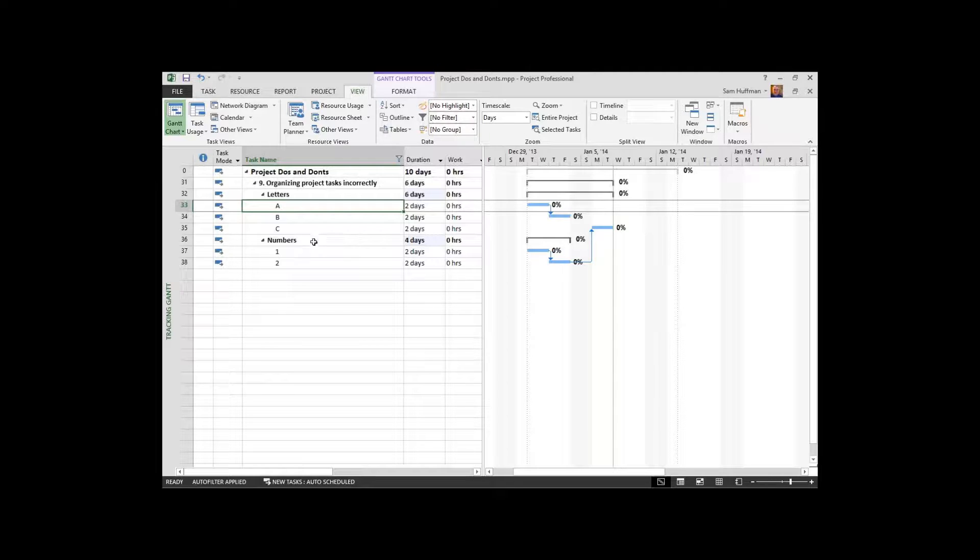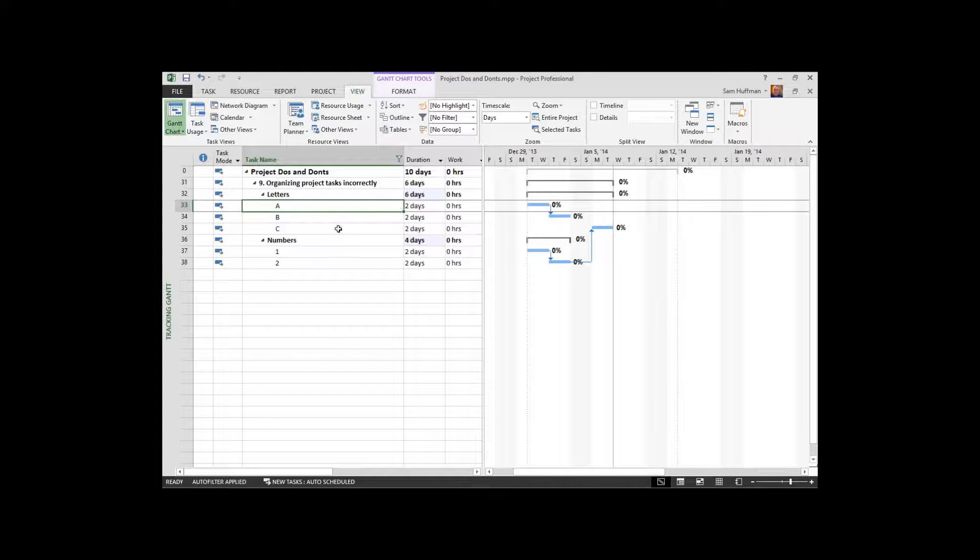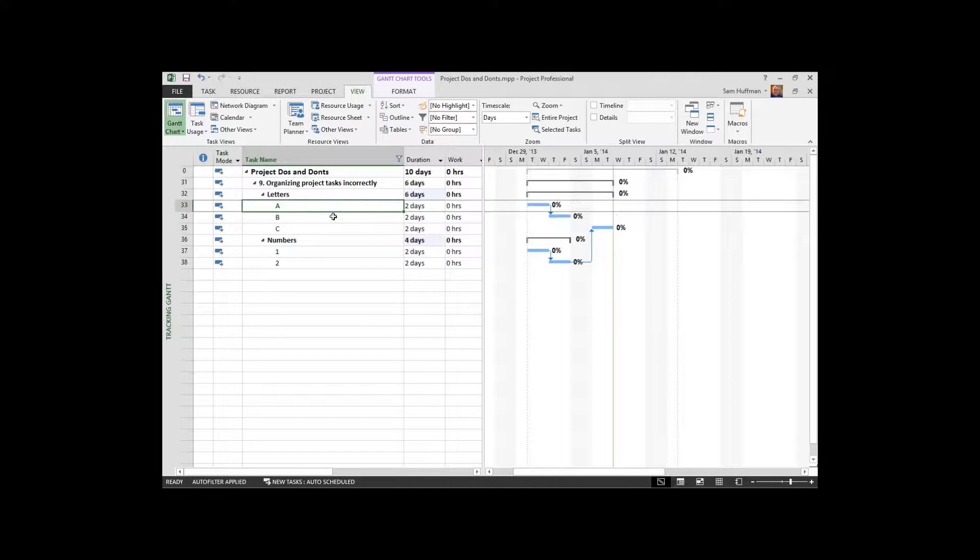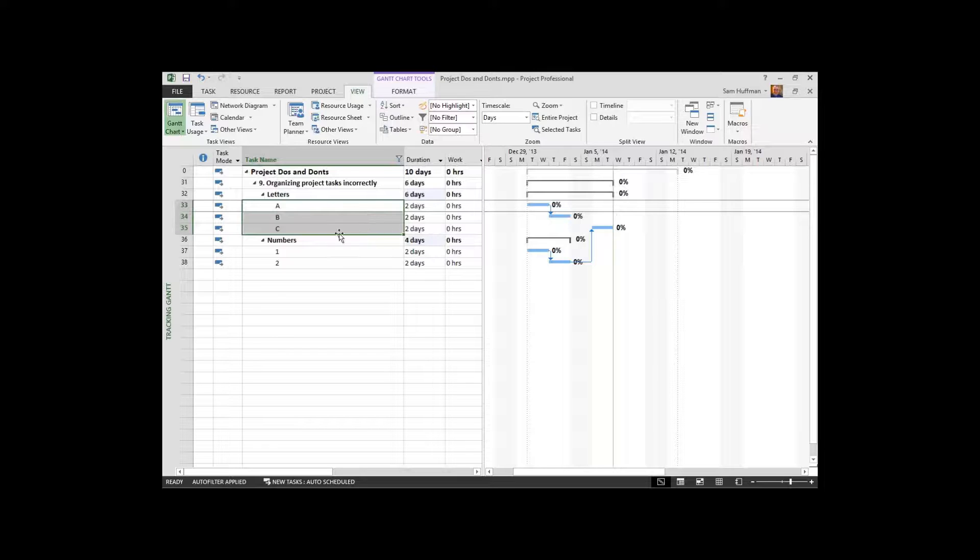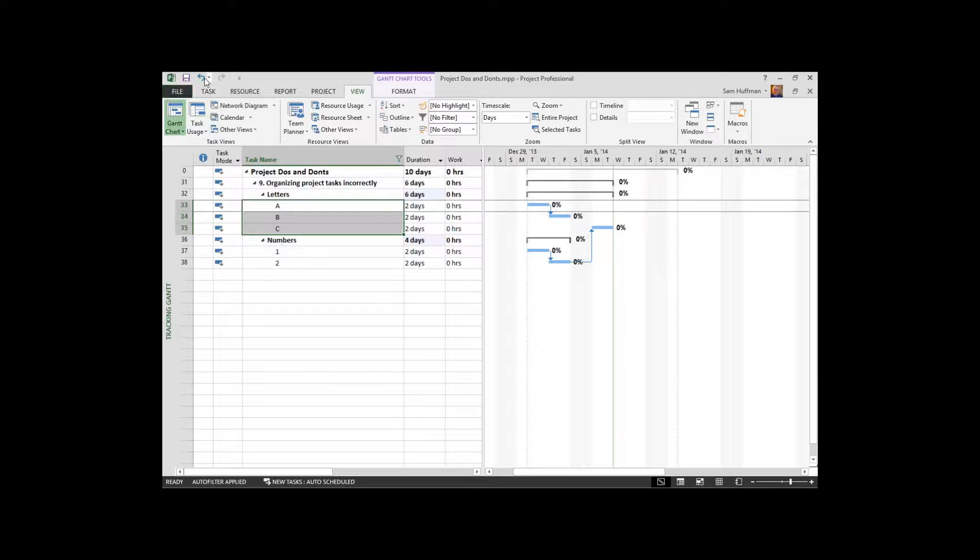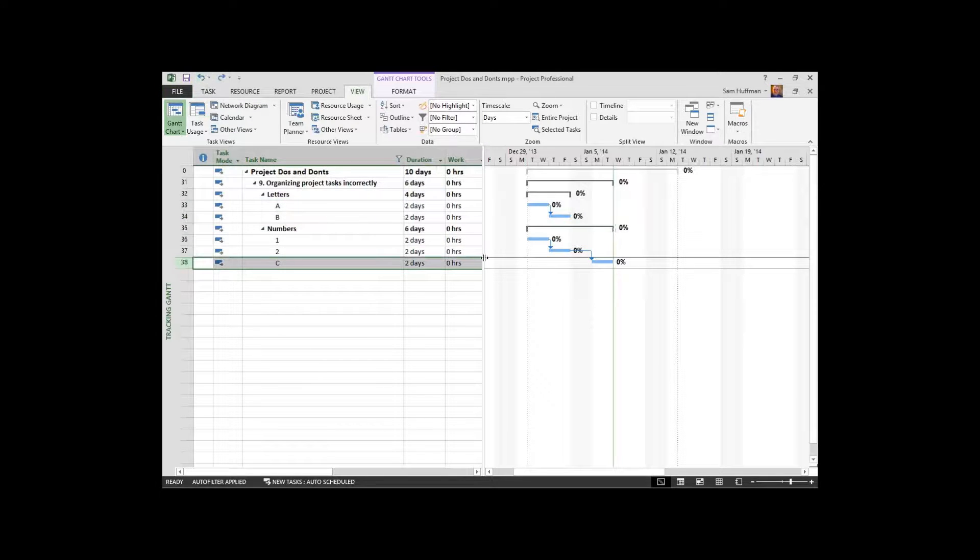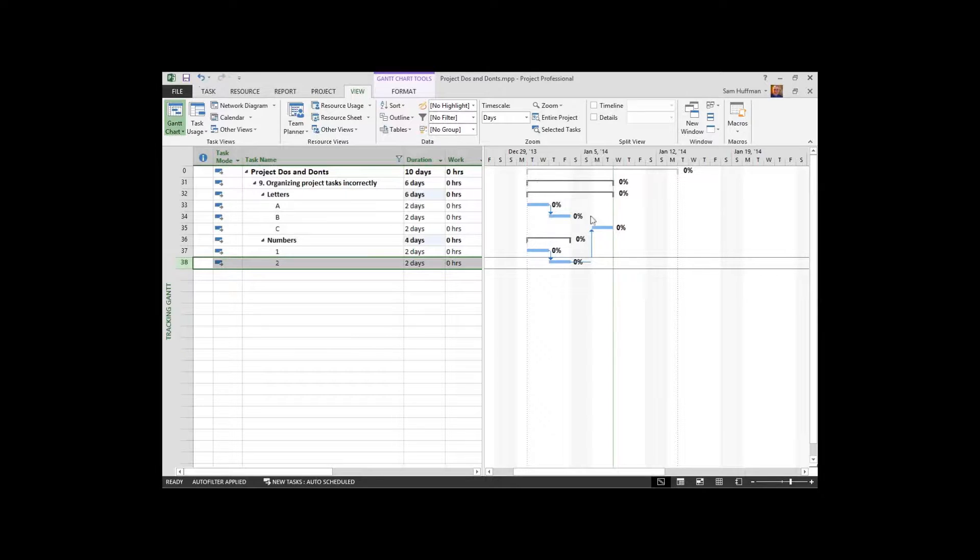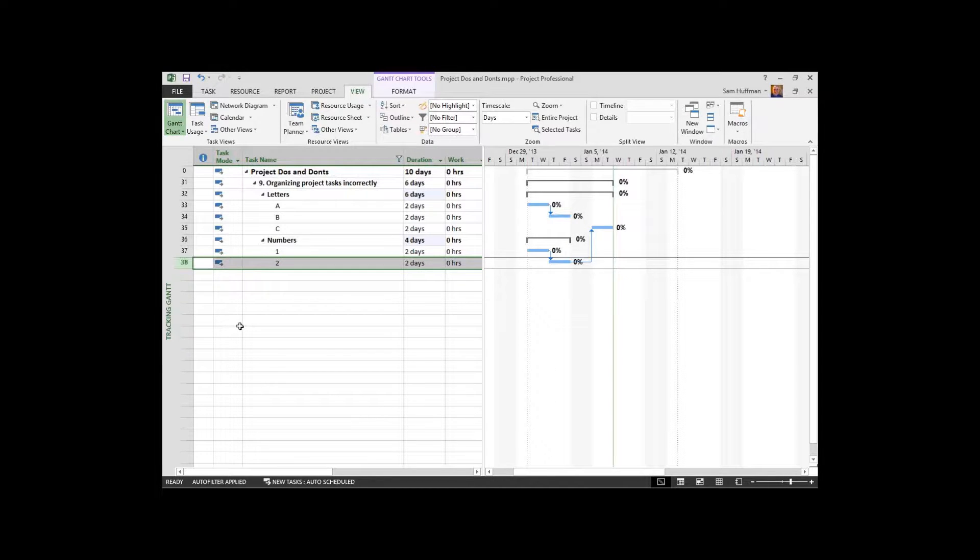So you know all else being equal if these activities and you saw this last activity now increasing the duration of the letters, without this third activity in the summary task organization, we would show a completely different duration. So it would be very much a different project. Let me undo this and go back to see. Notice that we dropped now letters is now a shorter duration than when we had the task in the proper place. So here we go, the duration increased because the organization is now correct. That was not a tenable schedule given the error in organizing the outline.